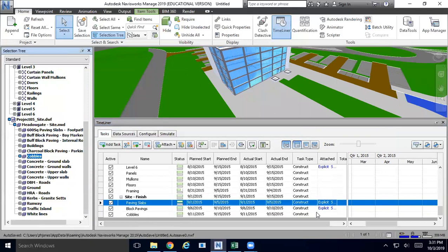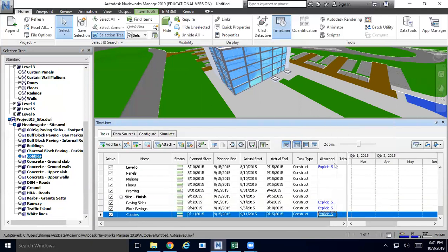Probably no. Let's go attach. Okay, so you see a lot of 3D objects here don't belong to the schedule. Do you know why? Because we haven't spent time to make the schedule better. So you know what you need to do now. You need to create a really good schedule, matching up with your 3D objects, at least at a higher level, and then you can basically link them, right?